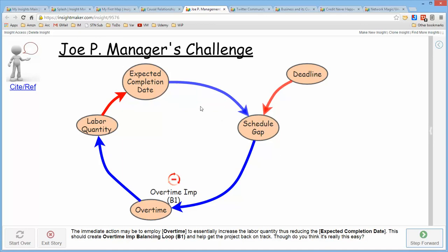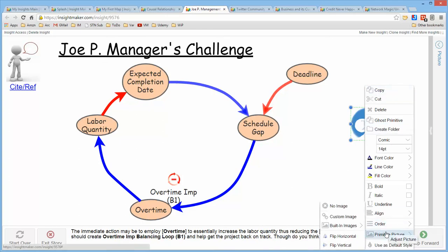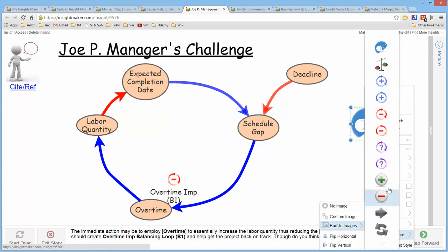To determine whether a loop is balancing or reinforcing, you walk the loop and count the number of 'opposite' or 'subtracts from' influences. If the count is odd, it is a balancing loop. To identify the loop here, we use the picture variable element and add one of the built-in images that InsightMaker provides for balancing and reinforcing loop indicators.